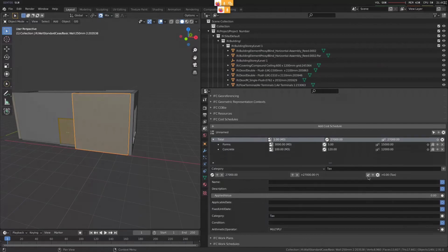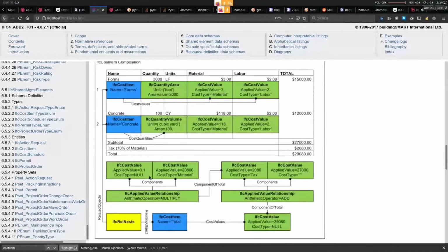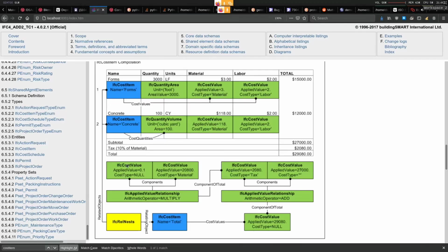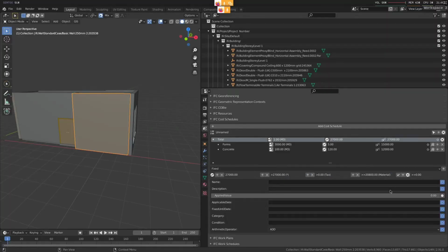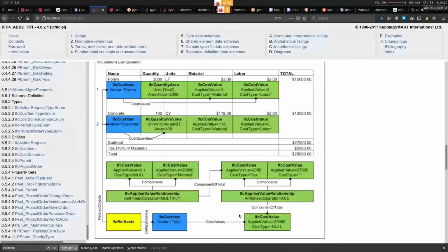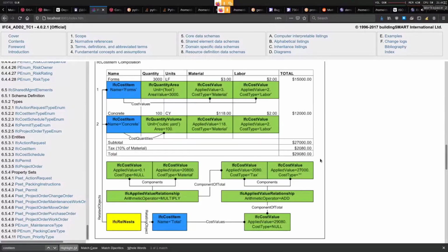and I'm really hoping this works, because otherwise, well, we coded it wrongly. So the tax will be multiplying the material category, and the UI here, as you can tell, is pretty crappy, which is 20,800, good, and a fixed value of 0.1. And this one here is 0.1. Okay, and then the final value we should get is 29,080. Yay, we coded it correctly! Hooray! Tax is 2,080. Great, so we coded it correctly.